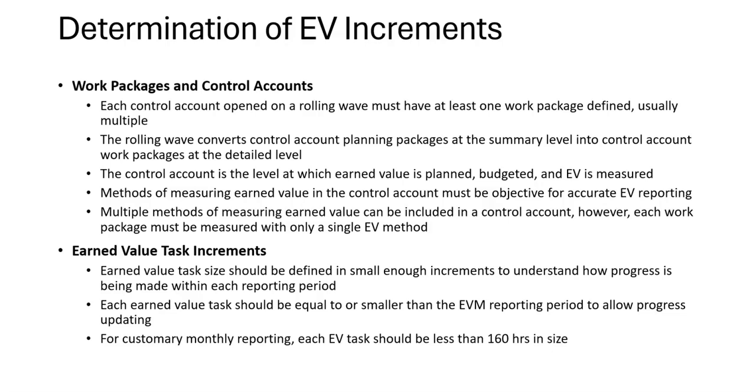So let's first talk about work packages and control accounts. Control accounts are at a very high WBS level and usually divided by major task functions, such as engineering development of a specific piece of hardware or production build of a specific prototype subsystem, so that you can accurately organize your work according to the work breakdown structure. Whereas work packages are within the control accounts, and those are specific functions that are being performed within that control account.